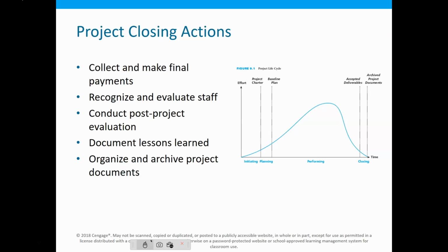Are there deliverables through that project? Yes. So those are those milestones, but this is when we finally accept the closing of it. So think about a house. There's milestones when you build a house. There's a milestone of, hey, we got the foundation poured. Hey, we have the walls built. That's a milestone. The roof's on. It's what we call dried in. In other words, it's environmentally sound on the inside and you can start doing inside work. So those are all a milestone along here.